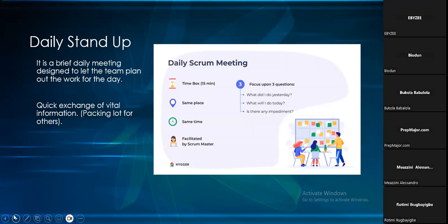Like I said, I thought I was going to tell you some approaches. You can say, how did your previous work yesterday help you achieve your sprint goal? That's me asking you what you did yesterday. Sometimes I note some of the things they say. So somebody says, I'm going to have a call with a customer to get data on something. I've noted it down. So today, when I want to start my conversation with you, I won't just say, what did you do yesterday? No, I'll tell you, yesterday you told us about getting data from so-and-so. How was it? Were you able to get it?